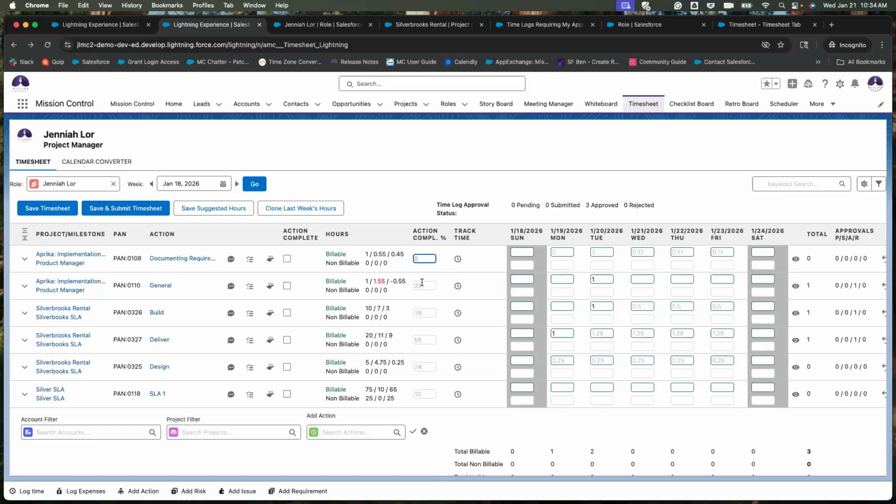The completion percentage, let's say you wanted to override that value, you could do that there. Adding that value for completion percentage could mean that you've done your part of the work, but even though I've done my part, the action is actually 75% done, not at 50%, but closer to 75%. That's updating the override for the action completion percentage on the action itself.